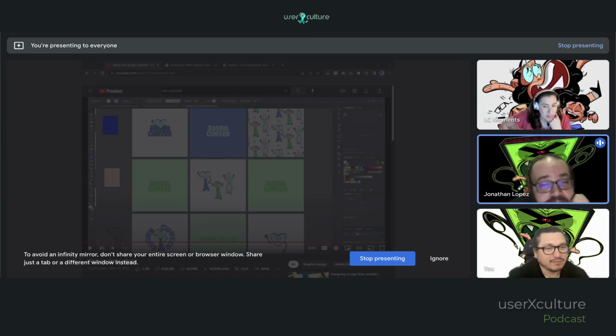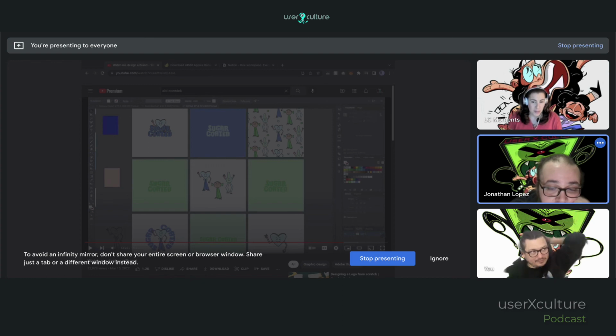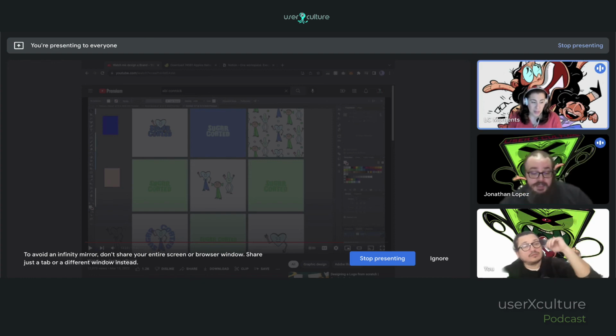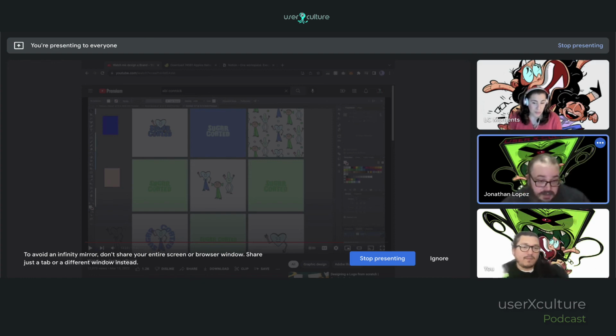Oh no. You write that in your contract, like how many you go through. Like I only get 3 revisions. That's it. Then you got to pick out of those 3. If there's something that you want to mismatch, like I like the S in this, you could do that, but then that's it. I've had clients get 90% there, and then they want to change everything. Well, we're going right back to redoing a whole other price now.